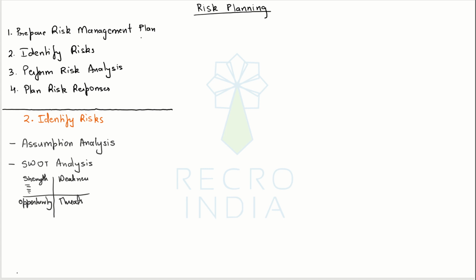You can perform a SWOT analysis for an individual, like you can do your own SWOT, your team SWOT, a SWOT for your project, for your department, for your organization. Literally, you can do it at any level. The main idea behind this SWOT analysis is to understand what are the strengths, what are the weaknesses, opportunities, and correspondingly threats. So at the end of this analysis, whatever opportunities and threats we are able to find out, they are nothing but risks as per our definition.